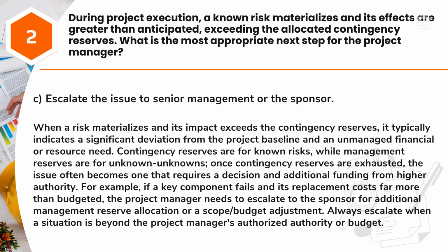Once contingency reserves are exhausted, the issue often becomes one that requires a decision and additional funding from higher authority. For example, if a key component fails and its replacement costs far more than budgeted, the project manager needs to escalate to the sponsor for additional management reserve allocation or a scope/budget adjustment. Always escalate when a situation is beyond the project manager's authorized authority or budget.